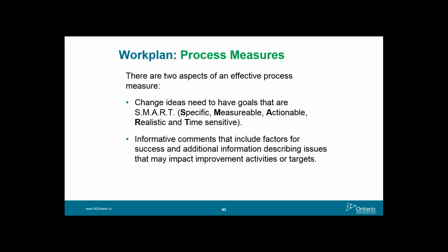You look at the method of how they're going to do it. They're going to look at the previous 6 months. It's going to be a number of falls in the past 6 month period, or the number of falls charts reviewed in that period. Then by June 30th, 2015, the Falls Prevention Subcommittee will present their findings to the larger Falls Committee.